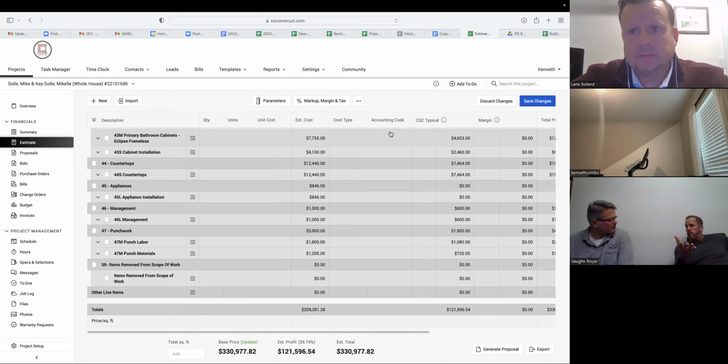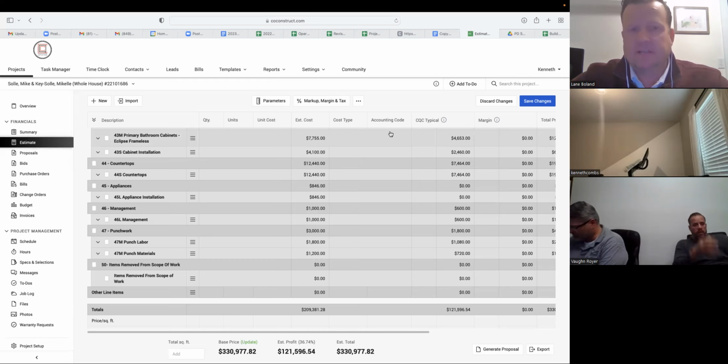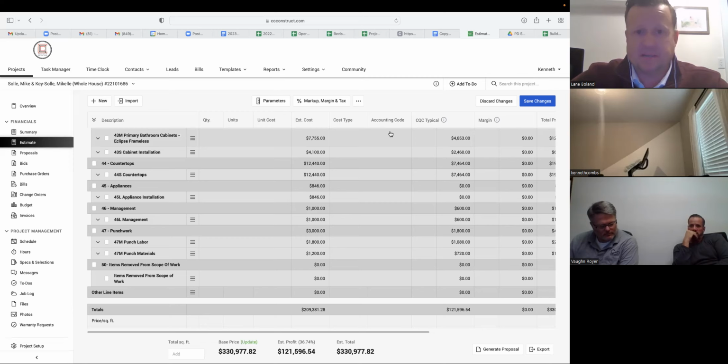But he has a process using this software. The only reason I say I have a process is CQC doesn't use Clear Estimates because we have a big in-house staff. My company in Columbus, Ohio, Buckeye, uses it. BMW, which is also a smaller shop, uses it. Let's get ourselves a subscription and we'll get Clear Estimates set up. It's really great. We just put in the square footage and what we think we're going to build, and it spits back a reasonably accurate breakdown of costs.